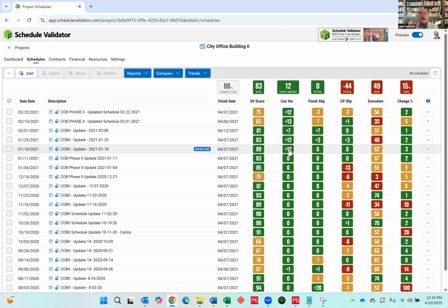Right. So the term you'll hear most often is they'll call it a re-baseline, or a revised baseline. And typically, you don't always do this, but in a lot of schedules, you go into your schedule, you put a constraint on the substantial completion that's linked to the contract date, right? And so you can't just arbitrarily change what your contractual completion date is until you get a change order.